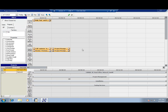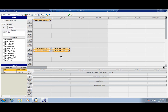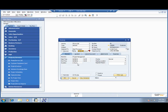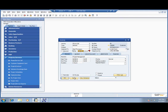We also have a project scheduling window meant to run on a dual monitor system. You can sort this by your employees or users, your projects, contracts, and customers, and properties related to your customers. You can simply grab a project and drag and drop it to an employee — drop it on their calendar. We open up activity number 81. You can see we've assigned this project with Linda and SG Electronics to Brad. Looks like SG is over their credit limit, so something to follow up on to make sure we don't lose any revenue working with this particular customer.